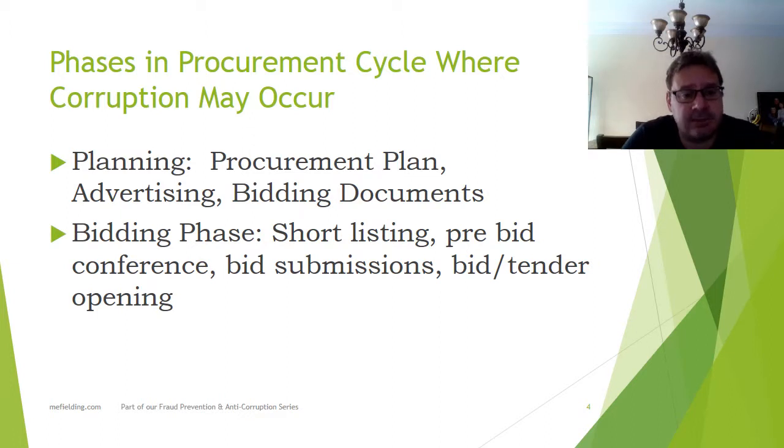Well, the first thing that they'll have is a procurement plan. We always have a procurement plan, and as the name suggests, it's not very hard to deduce what this is. It's a plan for our procurement, which will show cost, the kind of things that we're looking at, and when, so that we can also plan things like our cash flow. And if you're doing something like building football stadiums, you also need to know when goods are going to be delivered. One of my clients back in Scotland was a shipbuilder, so it was very important not only that you knew what was arriving, but when it was arriving as well, because you had to make sure that you had space in the warehouse for enough bodies of steel and so on. Otherwise, what do you do with it?